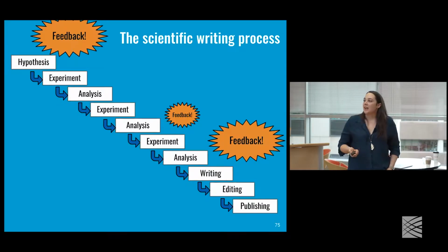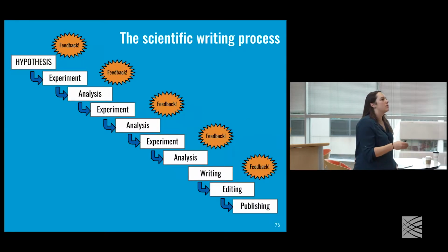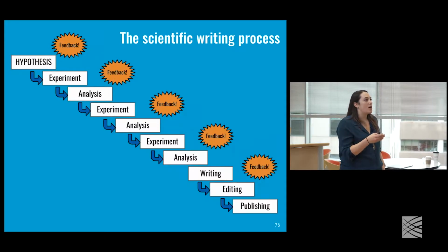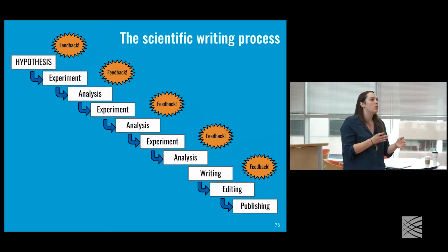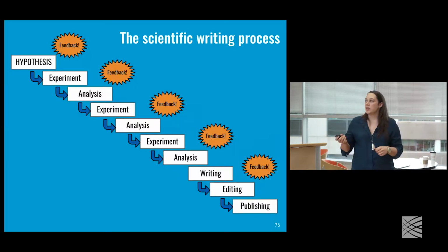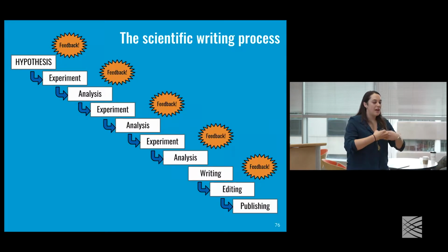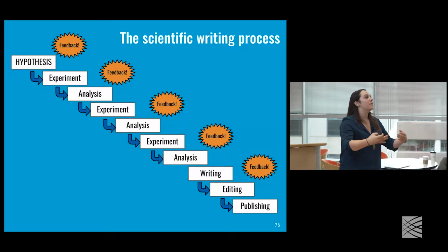I would argue that by doing specific iteration reviews throughout the duration of the project, you're going to know sooner whether or not you're headed in the right direction, and you can course correct earlier to get yourself to a stronger deliverable. So in this case, say every 3 weeks or so, having a specified check-in where individuals working on a project know that they have to deliver and present the most value that they've provided so far.